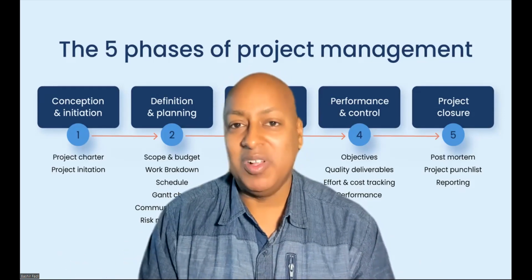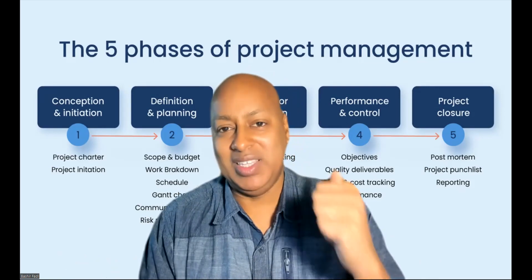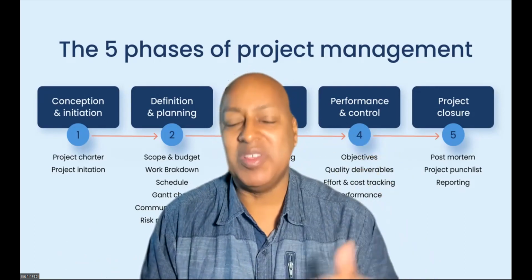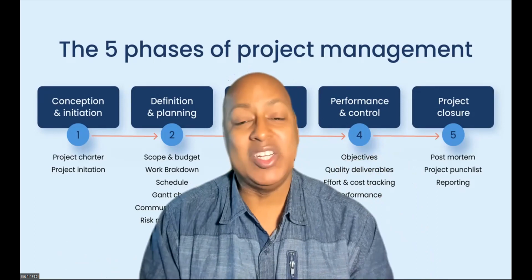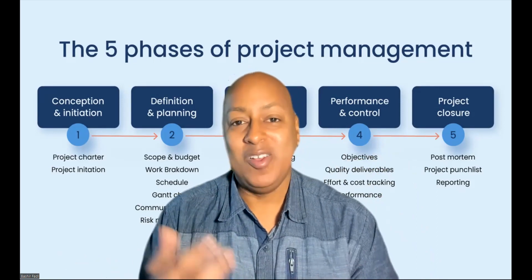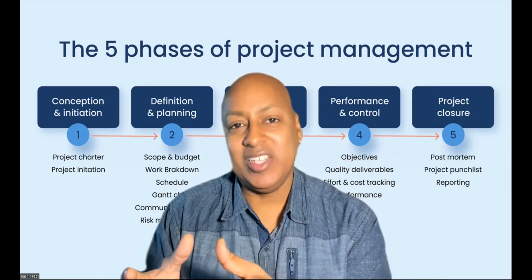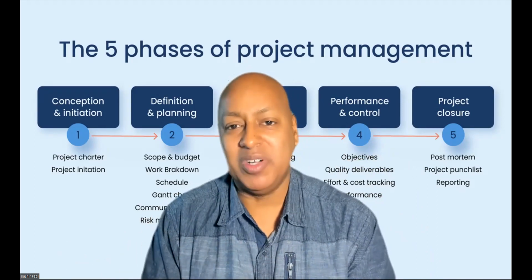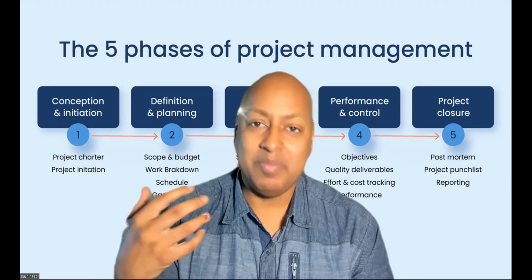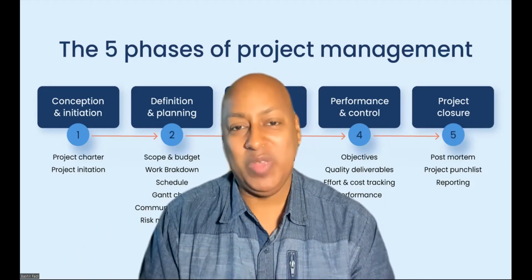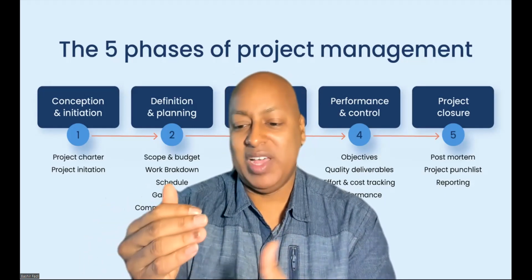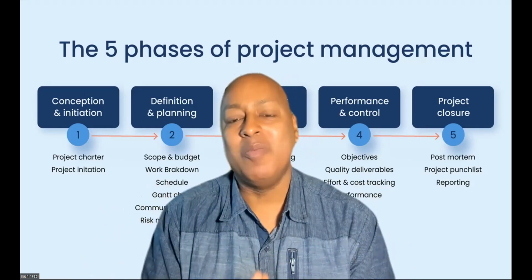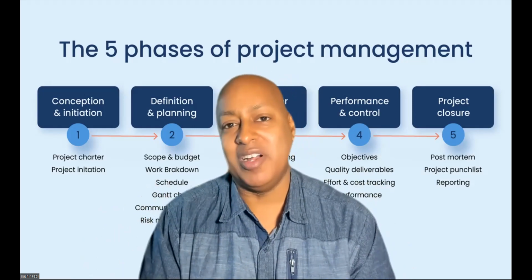So on a higher level, our project plan should have, number one, a task. What are the tasks that we have in that project? Number two, a description of that task. Number three, who is that task assigned to? Who's going to be working on it? Is it a person? Is it a team? Is it multiple team members? Number four, are there any dependencies on that task? We can't do number three until we finish number five or number two, whatever the task is. But we need to identify what the prerequisites are.